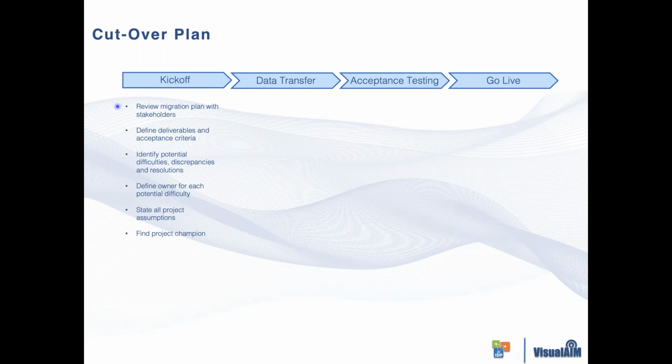That's why also as a part of that review, we clearly want to define with the client what the deliverables and acceptance criteria are for the software, because you could potentially fall into the rabbit hole of basically developing additional or more items as you go along the migration process that perhaps were not part of the initial scope, based on additional things that start to come up as you do the migration process, as plant personnel start to test out the software. So you really want to hone in and clearly define what the deliverables and acceptance criteria are going to be for the migration, such that you don't get to that particular pitfall.